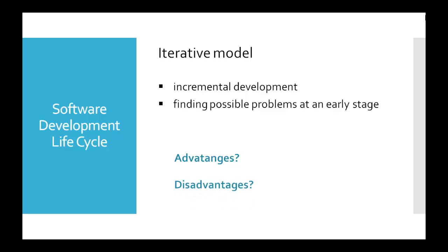The main disadvantages of this model are the following. More management attention is required. It is not suitable for smaller projects because it is hard to break a small software system into further small serviceable increments or modules. The end of a project may not be known, which is a risk. Highly skilled resources are required for risk analysis. The project's progress is highly dependent upon the risk analysis phase.